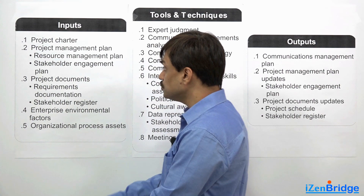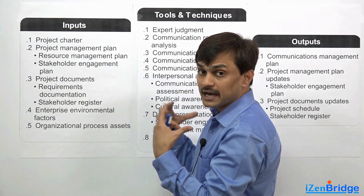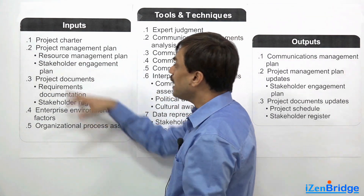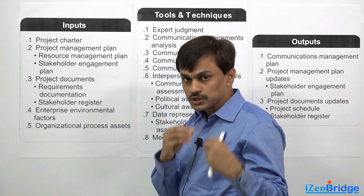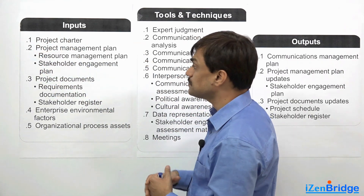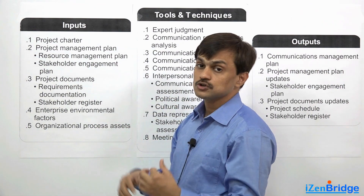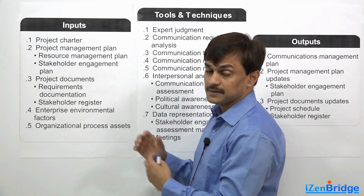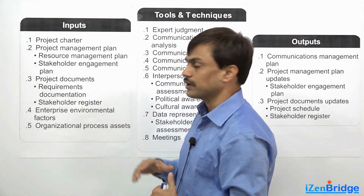In order to arrive at that agreement, you need to look at your stakeholders and your team. The resource management plan and stakeholder engagement plan give you an idea about your project team's expectations and your stakeholders' communication needs. You also need to look at your project charter — what kind of stress is placed on communication, key stakeholders, and urgency. You look at project management plan components primarily dealing with people, resource management plan, and stakeholder engagement plan. You also look at requirement documentation and stakeholder register to understand what information stakeholders may need, as well as enterprise environmental factors and organizational process assets.